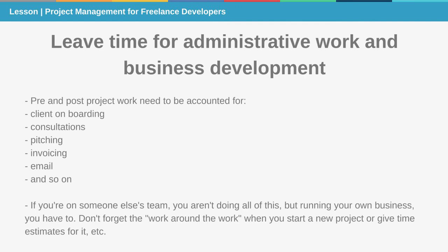Make sure you leave time for administrative work and business development in your business. You need to account for the pre-project work and the post-project work. This includes things like client onboarding, consultations if you do consultations before you take on a client or take on a project, pitching, invoicing, email, and so on. So you need to account for this when you're making time estimates and when you're giving people potential rates.